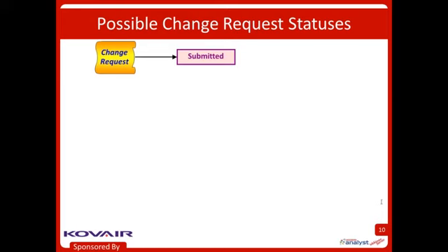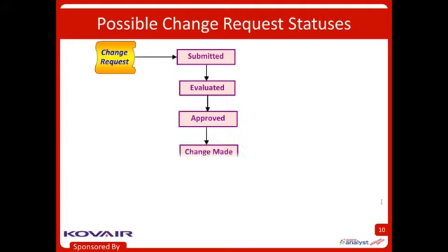So a change request starts out with a status of submitted. And all that means is, yes, it's come through an appropriate channel that we respect as a way that we get change requests. Maybe the appropriate decision makers ask somebody to go do a little impact analysis and evaluate this so we understand just what we're getting into if we say yes. And at some point we might say, well, that's okay, it sounds like a good thing to do, let's give it a status of approved.